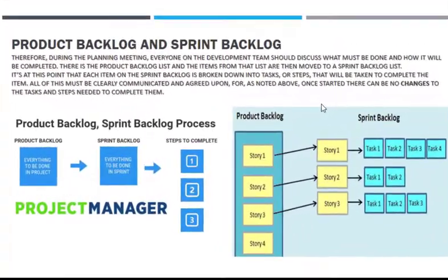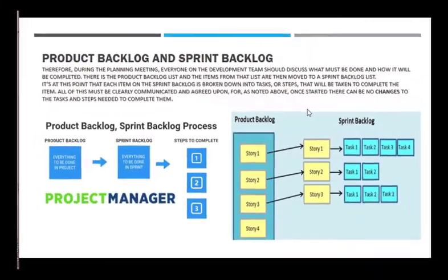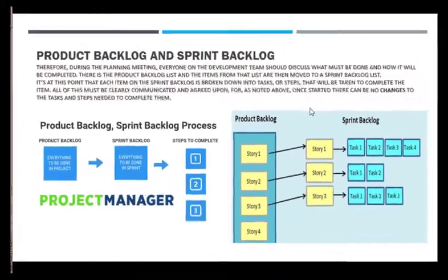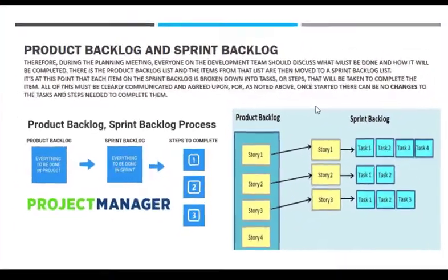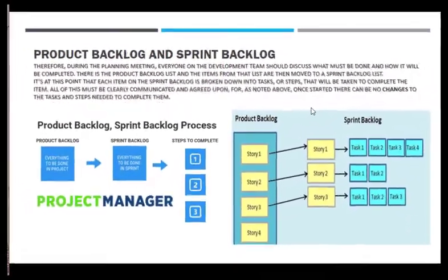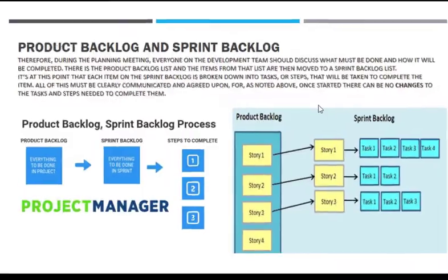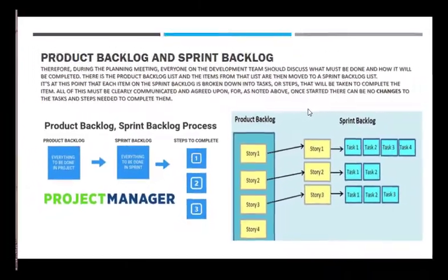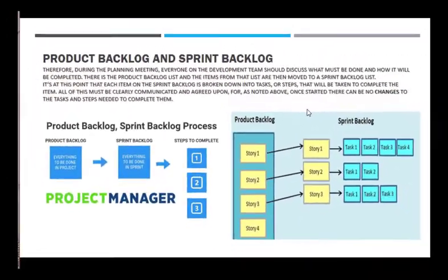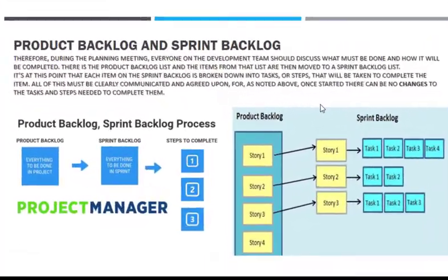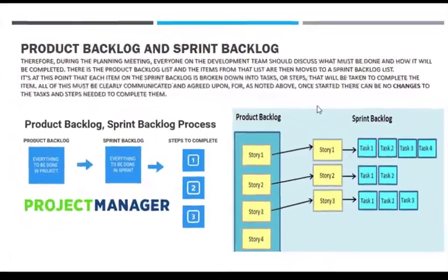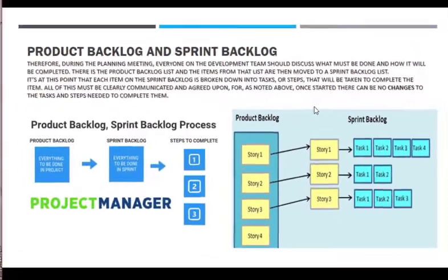For the sprint backlog, he pulls 3 user stories from the product backlog and assigns them to the sprint backlog. The development members take a user story from the ready-to-pull stage into the in-progress stage, and create task 1, task 2, task 3, task 4, etc. And one by one they complete the tasks in the user story.